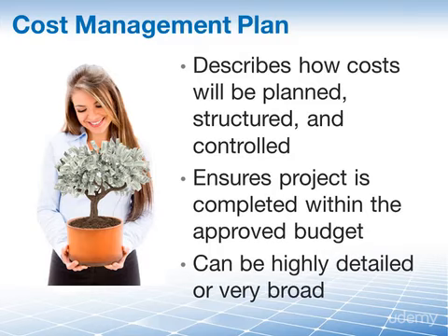The exact nature of the cost management plan is really dependent on the interest and needs of all the project stakeholders that are involved in your project. But generally speaking, the cost management plan defines how you estimate your cost, how you budget your cost, and also how you monitor and control your cost throughout the life of your project.